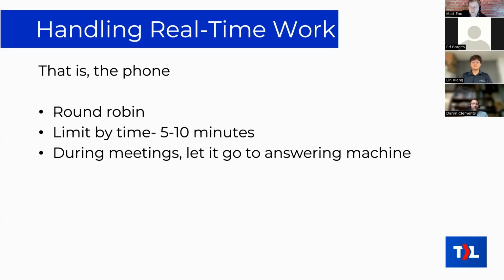I think that would limit the interruptions even more. So it could almost be like the dispatch role or triage role that might rotate through your team day by day or week by week. But make sure that all the distractions go to one person for a period of time at least, and that the distractions don't go to the rest of your team.